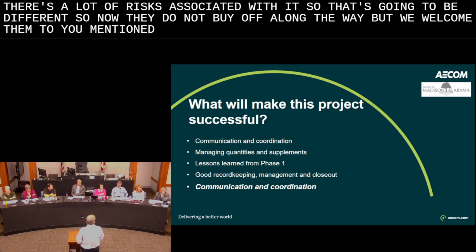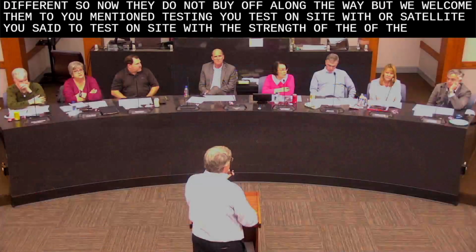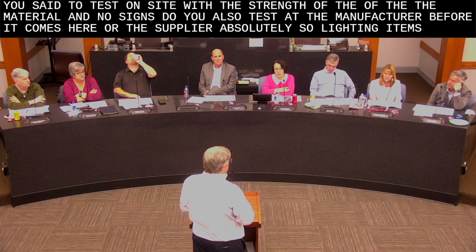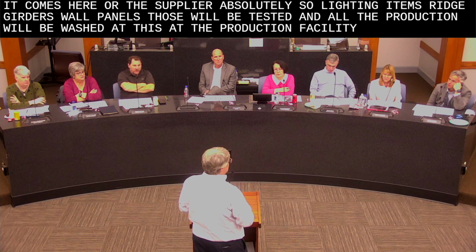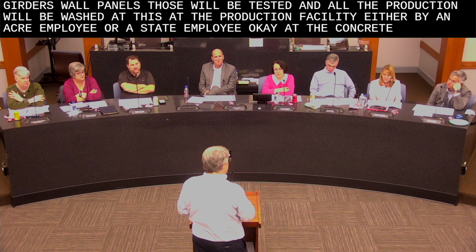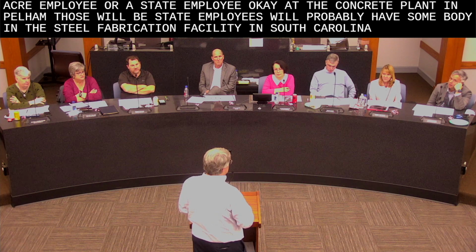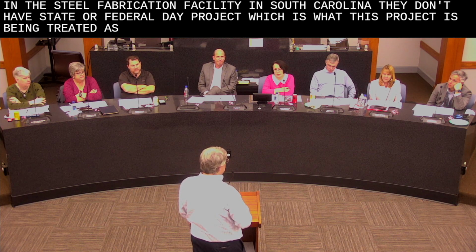You mentioned testing. You test on site the strength of the material and those things. Do you also test at the manufacturer before it comes here, or the supplier? Absolutely. Lighting items, bridge girders, wall panels will be tested, and all the production will be watched at the production facility, either by an AECOM employee or a state employee. At the concrete girder plant in Pelham, those will be state employees. We'll probably have somebody in the steel fabrication facility in South Carolina. They watch all the welds, they test them. Bolts are tested. Everything is tested on a state or federal aid project, which is what this project is being treated as. Okay, thank you.